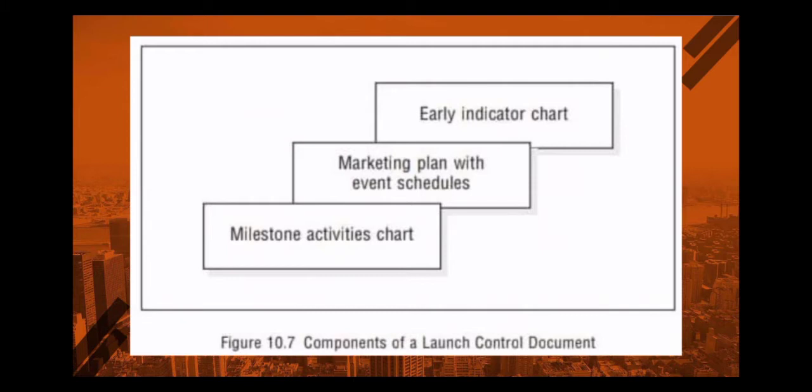However, as a recent Businessweek article stated, plain English is a language unknown in most of the manuals that are supposed to help us use electronic products. The format of the milestone activities charts can vary from a simple list of activities and dates to more formal project schedule and control techniques like Gantt and PERT charts.